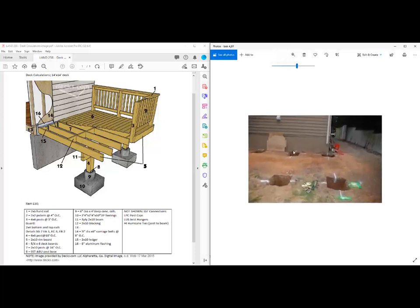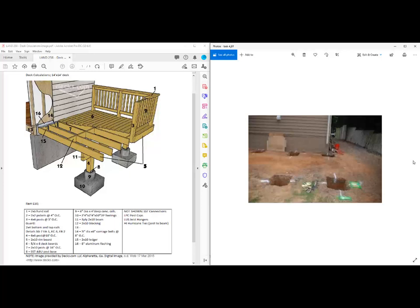We've got to dig holes. These are the things we need to understand can be done independently. Somebody could be working on the house, taking off the siding, exposing all the elements, putting in the flashing, the ledger board, and somebody else could be digging the holes. This is an example of the holes being dug. That's task number four for our project.